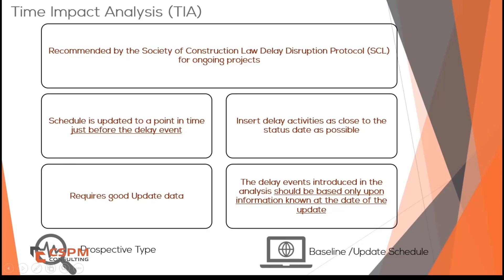Let's break this down a bit more. With Impacted As Planned, you take your original baseline schedule and insert hypothetical delay events to see how they might impact your project. While this method is useful, it doesn't account for the dynamic nature of a project where schedules are regularly updated to reflect actual progress.